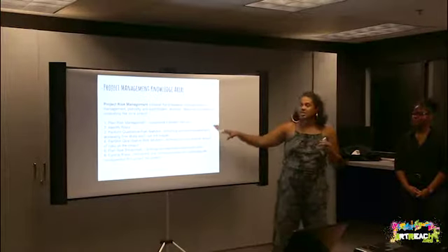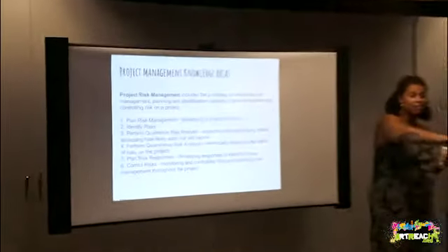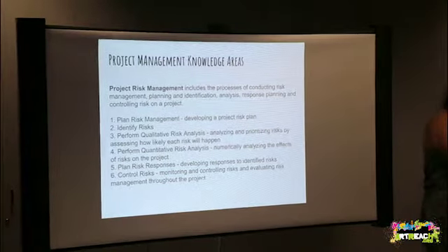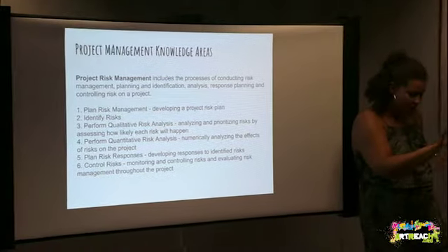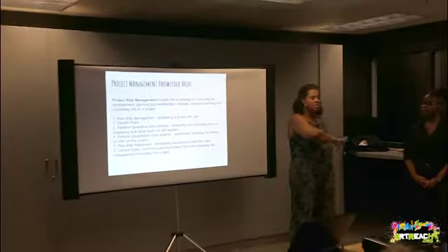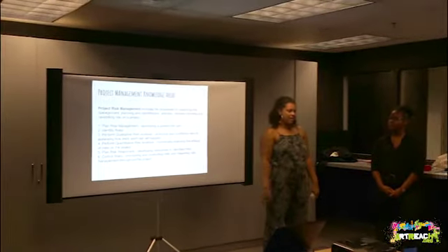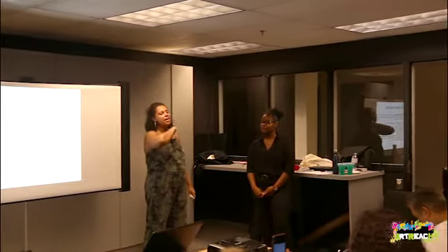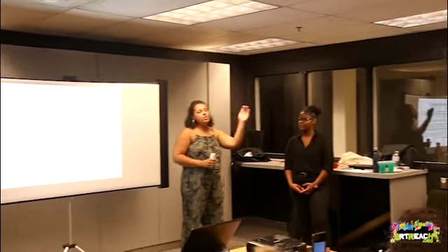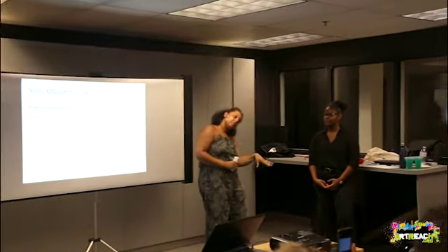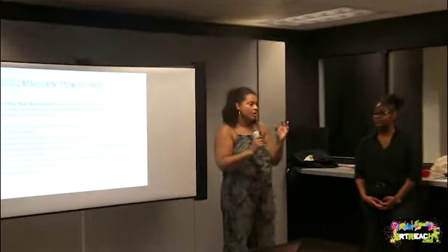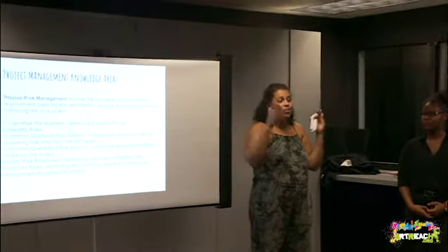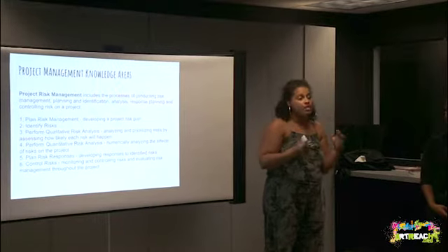Basically, what this means is that you will have given yourself enough time before the project even starts to think. Even if it's one meeting with all your friends or whoever's on your team, you say, all right, today's meeting is to think about all the bad things that could possibly happen in every single section of our project. And then we're going to come up with a plan for all of them. And then we're going to see which ones most likely would happen, which ones are least likely to happen, and what's in the middle, and you rank it, right? Just in that one meeting, you will have created that. And then when those things happen or don't happen, you're ready for them.